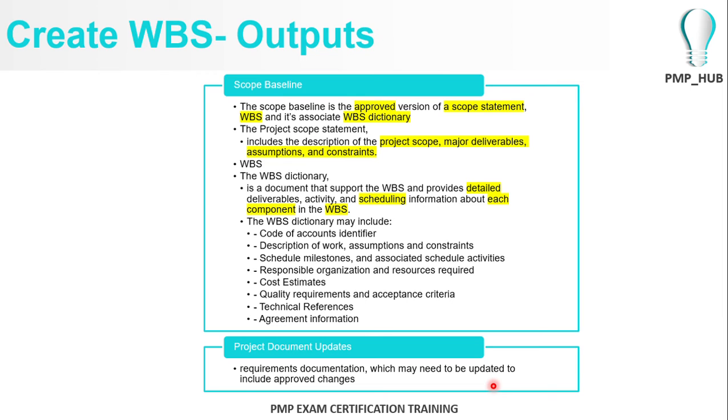So this is one of the examples. There are a number of formats on the internet, and it's up to you to define it. You can have your ID, your parent work package name, and the key milestones within that work package, the key deliverable milestones that are required. Maybe you have to purchase the wood, and purchase the stains. So those are the key milestones required here.